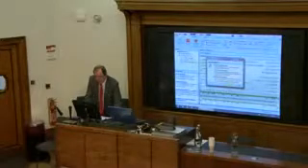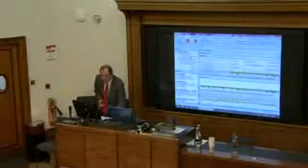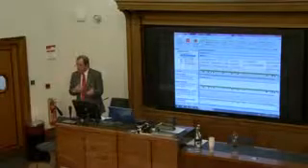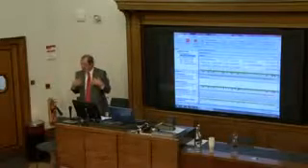So what I can do now is say, okay, I want to cleanse this plan, so I can just click remove all redundant logic, and what Fuse will do, it'll go through and remove all those duplicate logic activities, and I'll end up with a scenario called clean, and I can export that back into Primavera or into MSP, and so I can suck my plan in, get rid of all the redundant logic, suck it back into the source tool, and I'm left with my core logic.